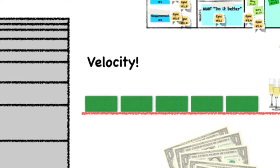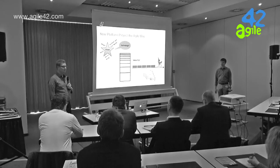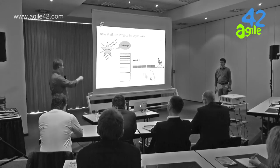So they went to the steering committee. They said, well, it's so and so many story points, that's this project, and the steering committee looked at the team and said, what does that mean? Well, that means so and so many sprints, we think. That means the cost is like that. So even though it was an Agile team, they were able to communicate to the stakeholders our assumption about time and cost for doing this project. And based on that, they